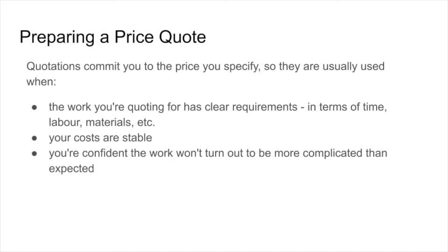if you're not clear on what the job asks you to do, it could cost you a lot of money, because you could think that they want to do something, but they actually want you to do a lot more or less. And again, that can cause you to have a mismatch between what your costs are and what you quoted.